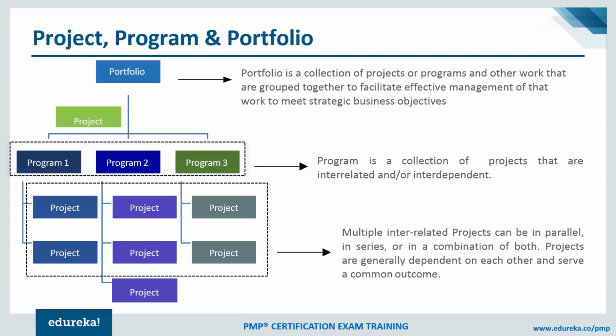So what the program manager does is he calls another person in and says, okay, I'm going to work with this gentleman, and he is going to create the processes and templates for the reporting. That person works with the program manager to identify the KPIs, the key performance indicators, which he would like to see in the review, and then sets up a process where every project manager sends the data by the end of Thursday to this new person who has joined the team. That person will collect all the data, consolidate everything, and on Friday send it to the program manager.